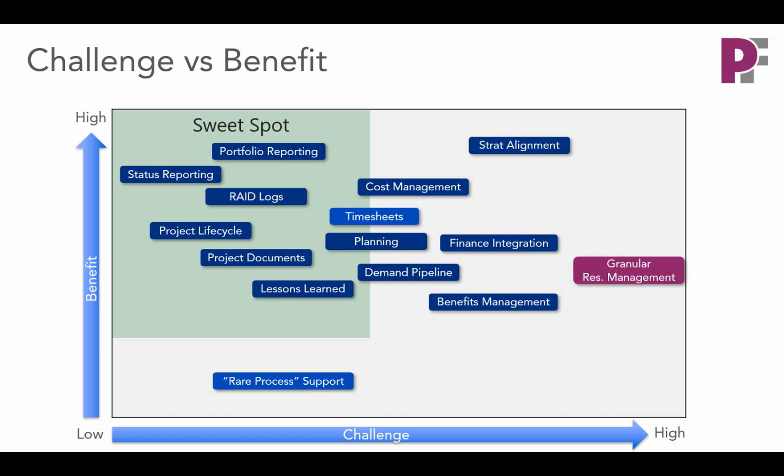The problem is all this granular information is always going to change because it's predicting the future, constantly requiring us to go back into our project plan, reschedule the work, lots and lots of work of keeping this data up to date and relevant. Very hard to do, very challenging. And there is an alternative, which I call top-down resource management, where we say goodbye to all this detail and we go to a higher level, and maybe that's just days demands per month per resource and thereby resource role, and then if work shifts within the month, we don't have to update that.